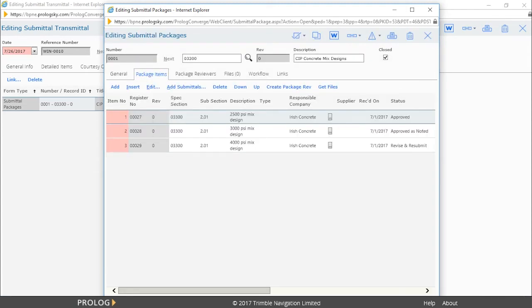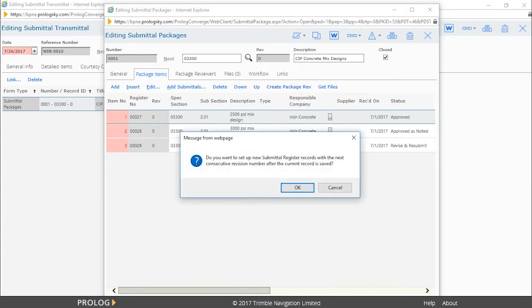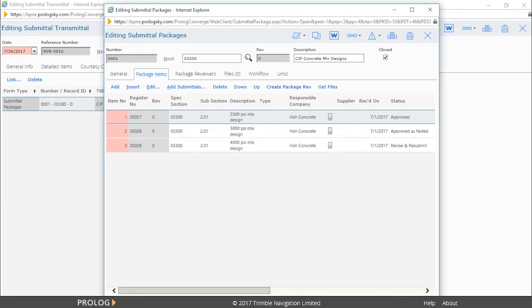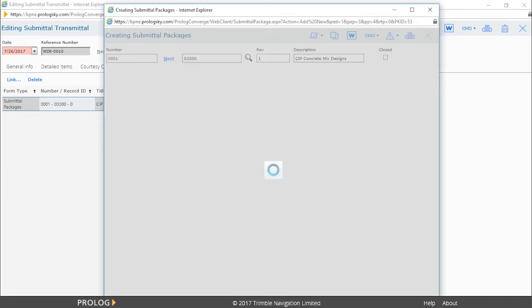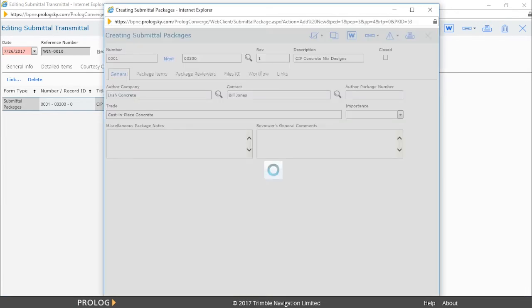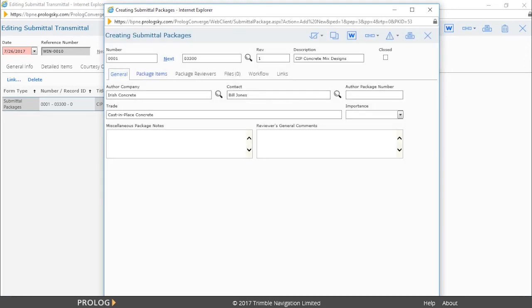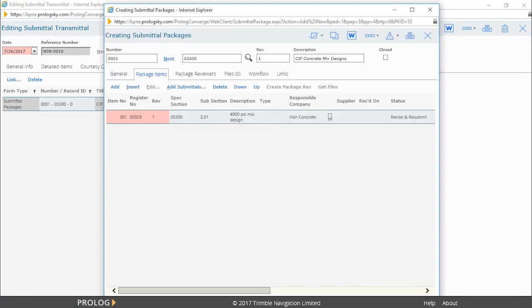Here, we can see the original submittal package and also create a package revision for the item to be resubmitted. Simply click Create Package Revision and then select OK. The system has now created a submittal register entry for the item previously marked as revise and resubmit.